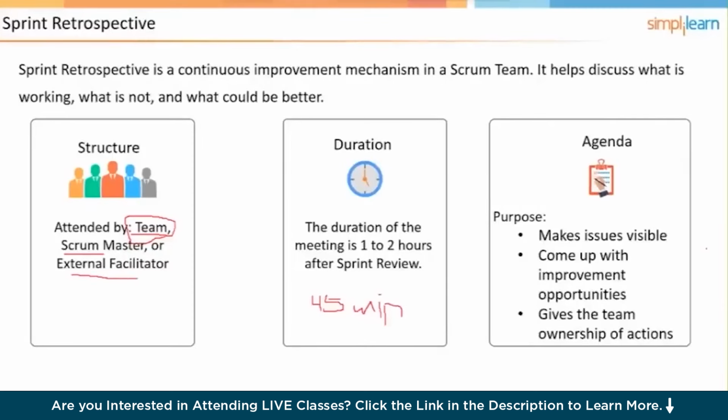And what's the purpose? There's the agenda for the retrospective, 3 questions. What worked well? What did not go well? What are we going to do different? And it's not just a chat session. Well, that would be part of it. You will use tools and techniques, like some that I mentioned: control charts, Ishikawa diagrams, 5 whys. There's a number of things that you might use in order to surface assignable causes for issues so that we could then come up with a resolution to those.